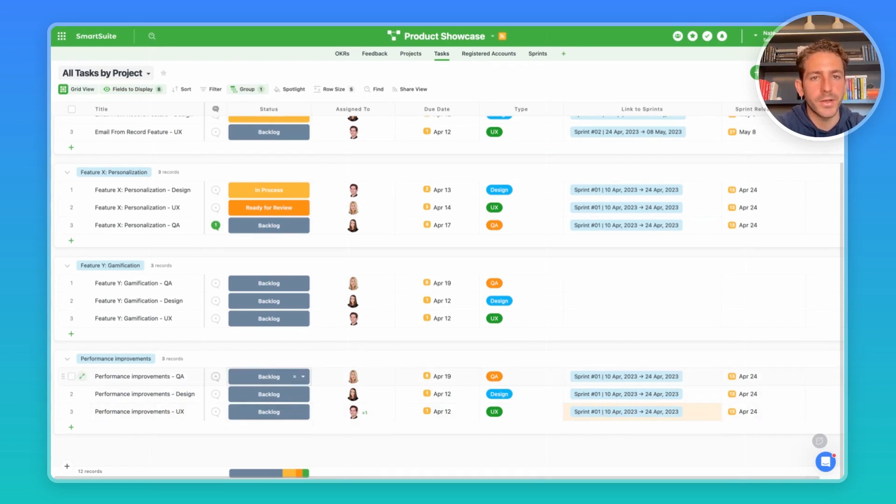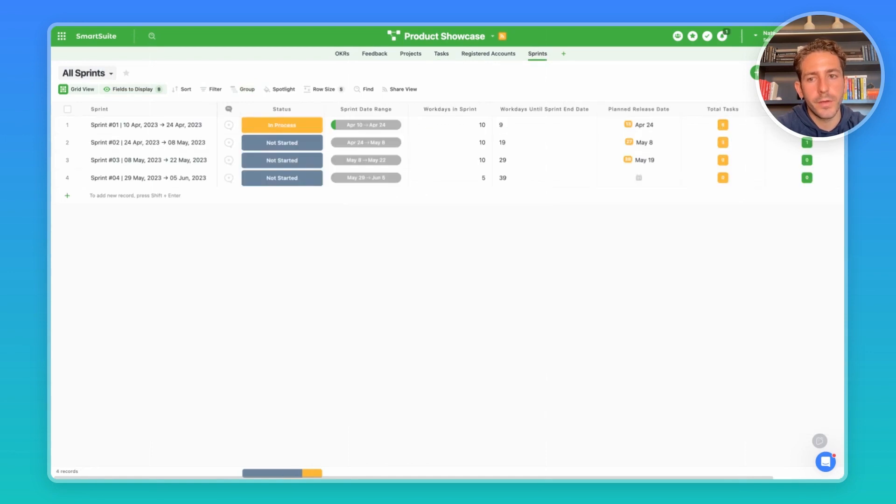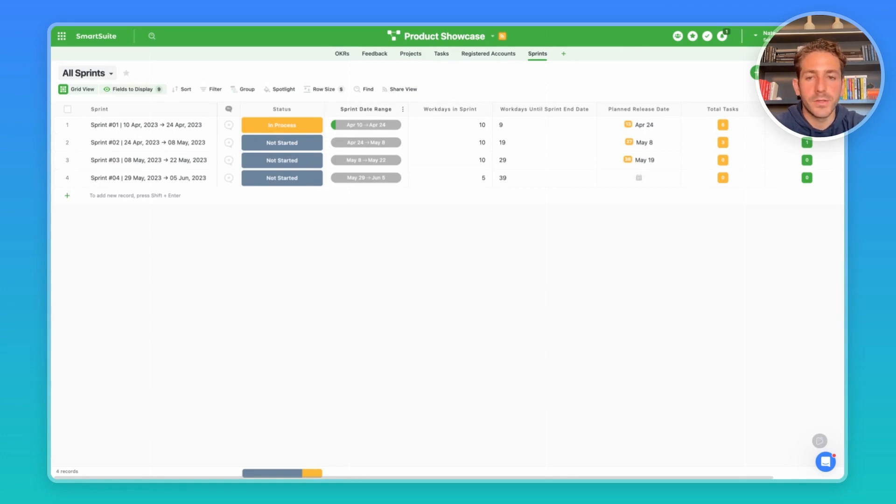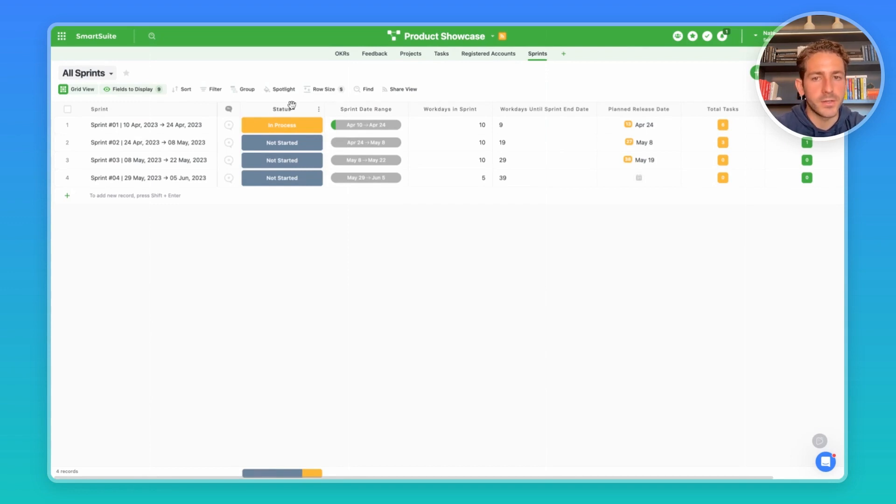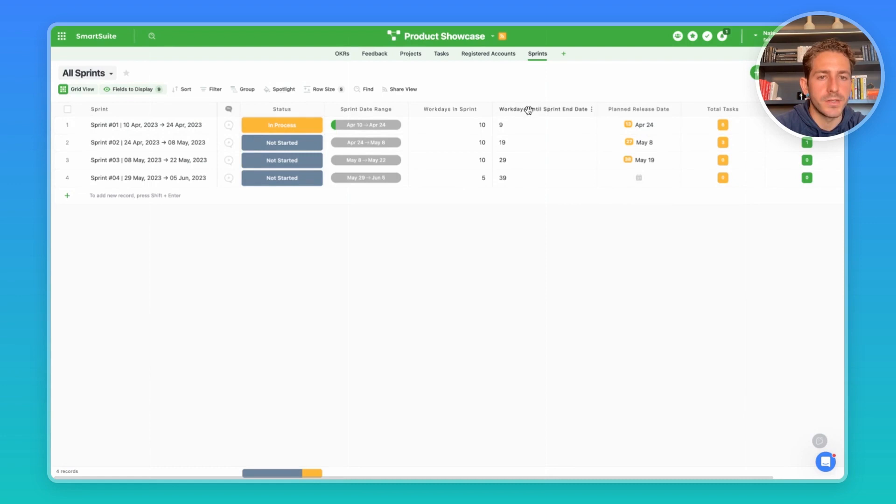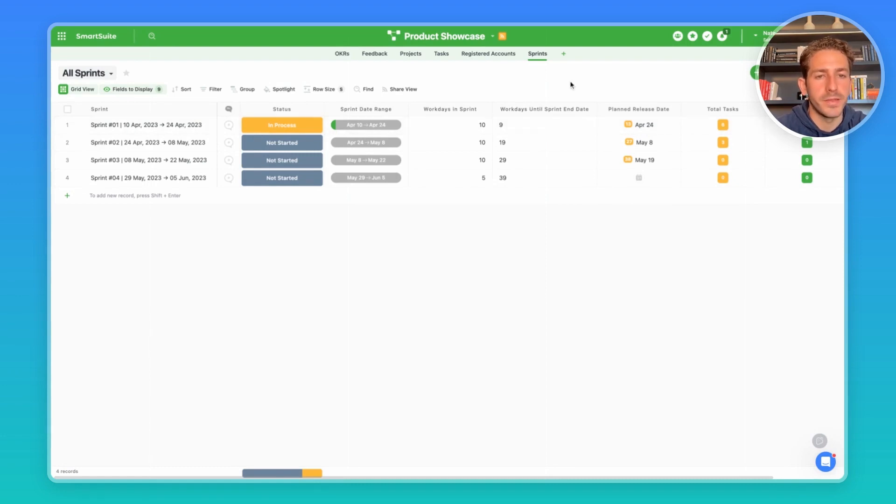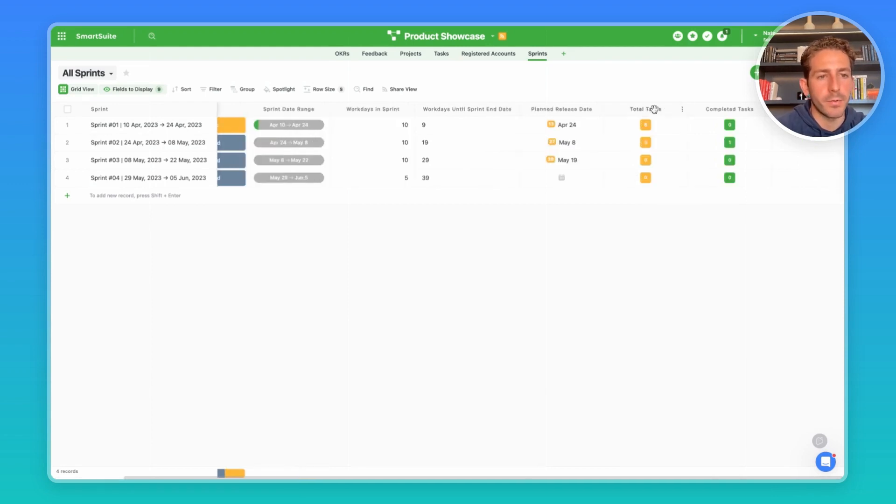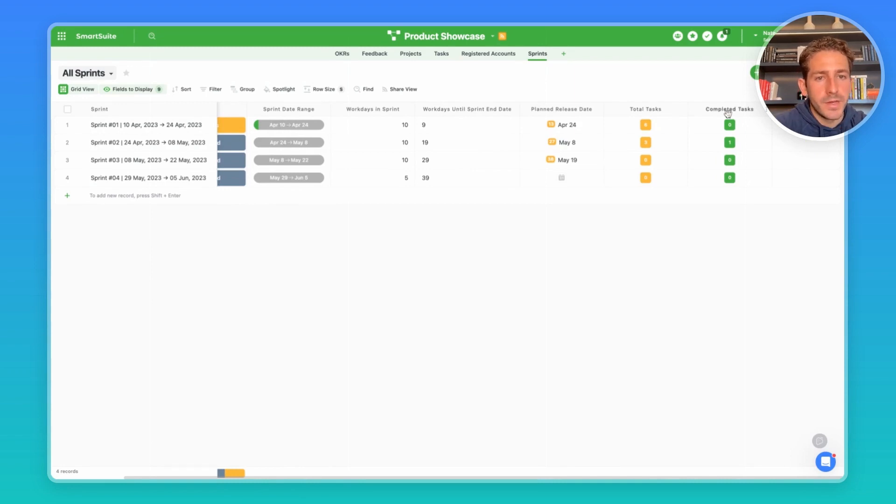Moving over to our sprints app we're able to see the work that's happening in fixed intervals. We have a date range for the sprint that can even add a scheduled time trigger that creates these two week sprints on an ongoing basis. We have a status tracking whether this date range is in progress or it's not started yet or it's complete. We have how many work days are in the sprint and the work days until the sprint ends so everyone can make sure that their milestones and the tasks that are coming from the new features or from systems like Jira are on track.